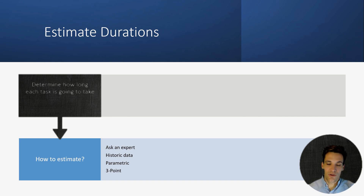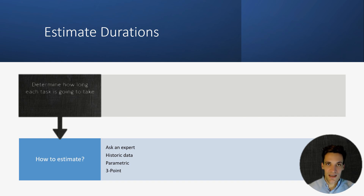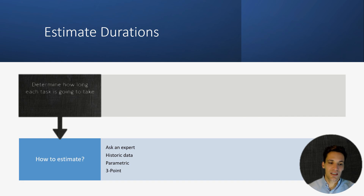We can ask an expert — go to someone who's completed a similar task on another project and ask for their input. We can get historic data by looking at similar projects and seeing how long that activity took, and use that as the basis for our estimate. Then we can adjust these by a parameter. For example, if trenching one kilometer took one month on another project, and on our project we need to trench two kilometers, we can assume that activity will take two months. That's parametric estimating.